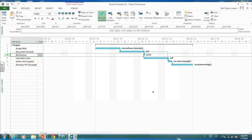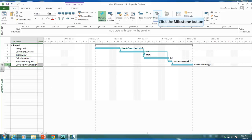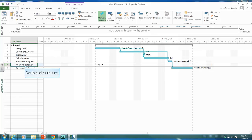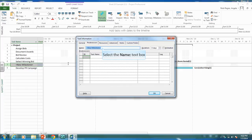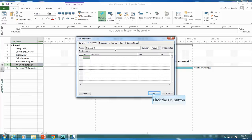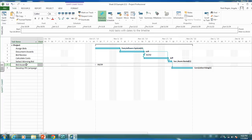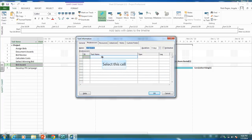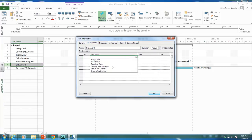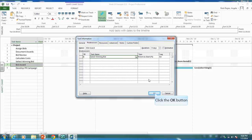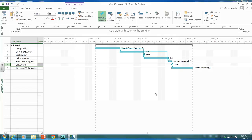The second milestone to add is Bid Award — after the winning bid has been selected. Click on row 7, insert a milestone, and name it Bid Award. As you can see it's floating without a predecessor, but this milestone will be complete once Selecting Bid has been assigned, so add Select Winning Bid as its predecessor.